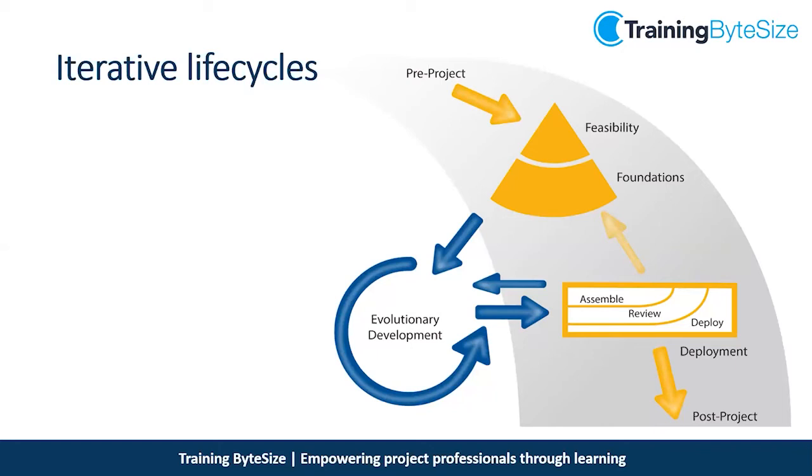It's saying, we've developed it, but we need to release something, so here's something out for you to use. However, once it's been released, they are continuing to develop it. They're continuing to add and change it and tweak it. So in a few months' time, another one rolls out to your phone, and it keeps being iterated. So iterative life cycles were mainly developed for software.